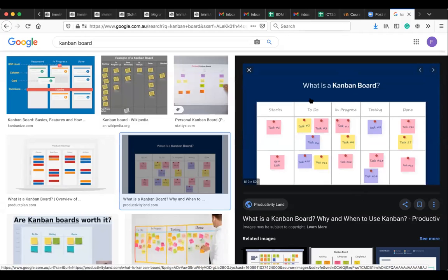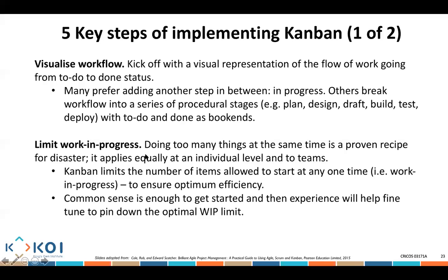So if progress is being prevented, you'll be able to easily see it because you're limiting how many items you have. You'll clearly see there's 4, and if 4 is your limit, straight away you know we need to help those people in the in progress stage so that the project can continue proceeding. That limitation gives you a visual representation of any issues and helps you work on getting things to progress as required to get the right outcome.